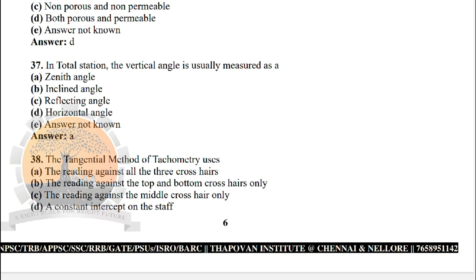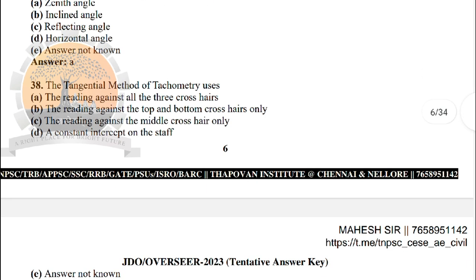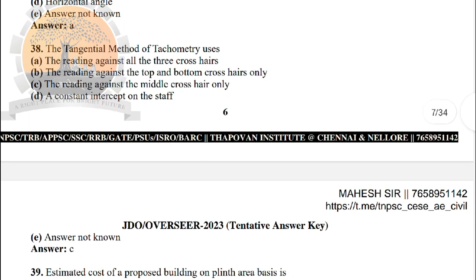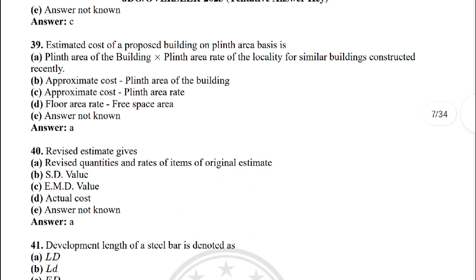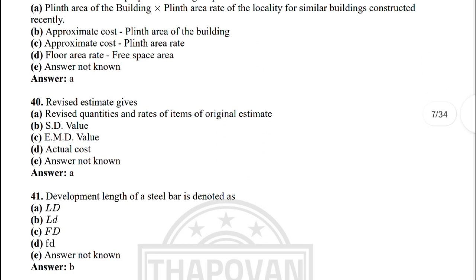Next: the tangential method of tacheometry uses — the correct answer is option C: the reading against the middle cross-hair only. Next: estimated cost of the proposed building on plinth area basis — the correct answer is option A: plinth area of the building × plinth area rate of locally similar building constructed recently.